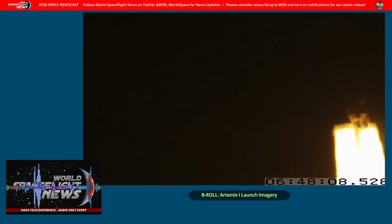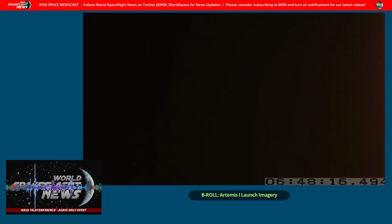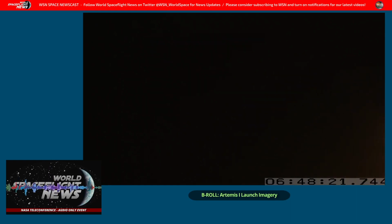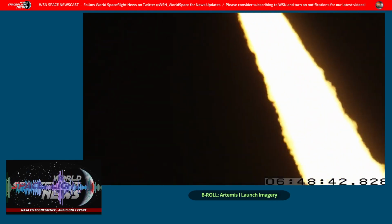Thanks. And Sean. Okay, so let's see. Well, we'll start our multi-element verification and validation at the pad this summer. The mobile launcher is projected to be ready to start Artemis II processing in December of this year. Stacking ops will occur early in the first quarter of 2024, and then our integrated operations will start around June or July of next summer, leading to the targeted launch date in November of 2024.